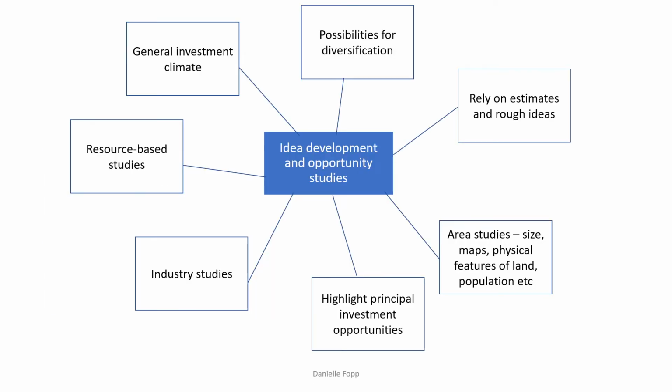Now, following the idea development and opportunity studies phase, we should have a project brief or multiple project briefs. And the project brief should set out the rationale for the project in a clear and concise manner so that the reader can understand why the project is being proposed, what objectives it is seeking to achieve, and what other options have been considered with reference to any company or project policy requirements.